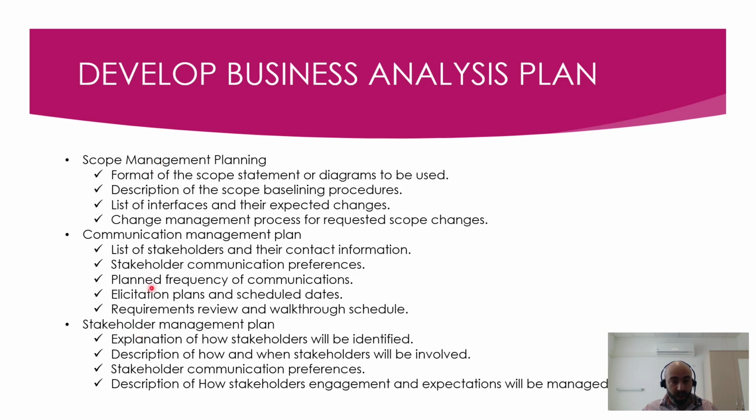In addition, a business analysis plan contains a stakeholder management plan, which is an explanation of how stakeholders will be identified, a description of how and when stakeholders will be involved, stakeholder communication preferences, and a description of how stakeholders' engagement and expectations will be managed.